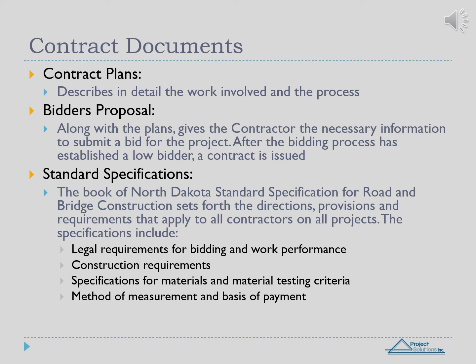Contract plans describe in detail the work involved and the process. Bidder's proposal, along with the plans, gives the contractor the necessary information to submit a bid for the project. After the bidding process has established a low bidder, a contract is issued.